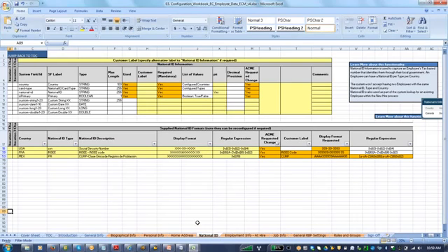Once we get this, we will do the configuration accordingly. The configuration workbook is a very important thing. We need to drive home the point to them to update it on an ongoing basis, and take the sign off. That is very important again, and then do the configuration after the sign off is done. Before that, we should not do anything.